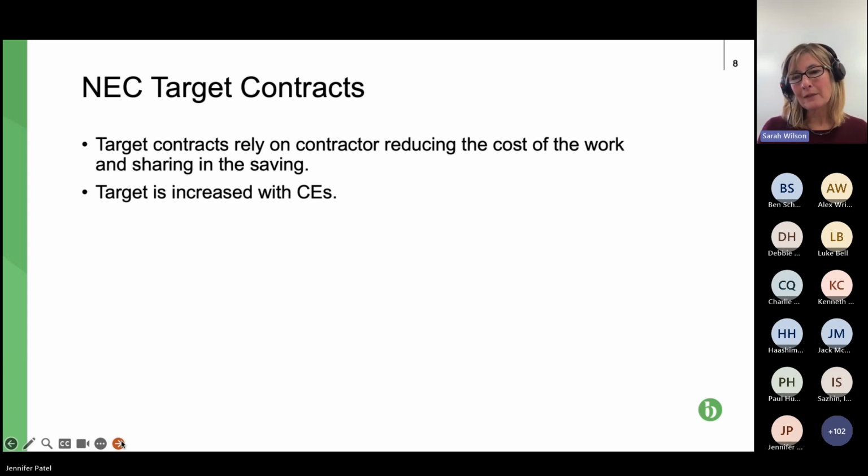Bill of quantity is slightly different in that it will change as regards compensation events, and also if there's any element of remeasurement. There's also an issue because, of course, this is increasing the target cost, the figure at which we assess whether there's a pain gain sharing, whether it's pain or gain, between the parties. So in practice, typically what you will have towards the end of the project is some compensation events where the compensation is agreed, somewhere it's not agreed.